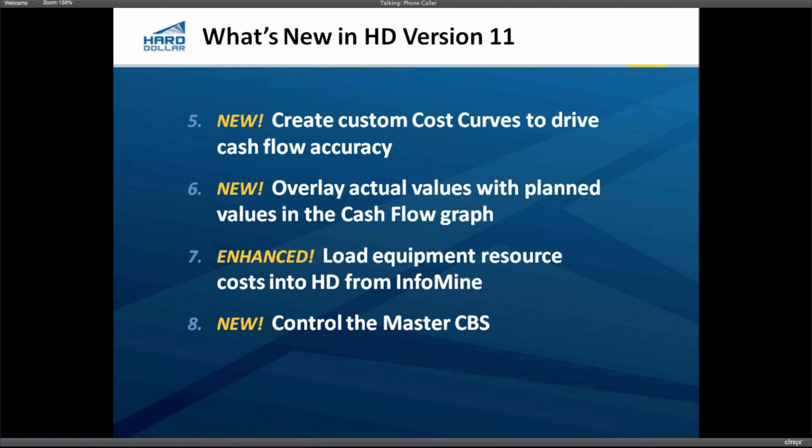live basis. So if you have an InfoMine subscription, you can pop out into InfoMine, choose a fleet of equipment, go in and pick a bunch of different machines that you want to use in your estimate, and instantly bring those machines into hard dollar along with all of their rates. So InfoMine is maintaining what they think is the operating and ownership costs of hundreds of different mining machines. Okay, so if you don't have a good history of what those machines should cost you, you can go out into InfoMine, pick the machines you're going to need, and the cost is already going to be there. You'll be ready to go.